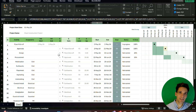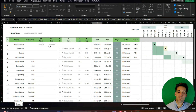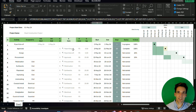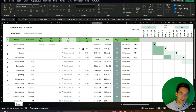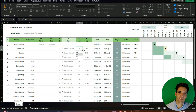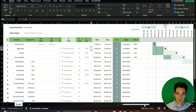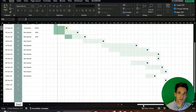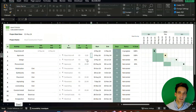You can list out your tasks, you can assign these tasks to an individual, you can manually set the activity start and finish dates, or you can do it using dependencies. For example, you can link activities based on the sequence. We've got different types of linkages — finish to start, start to finish — depending on what you need. If you've used dependencies, it will automatically calculate the start and finish dates and plot a Gantt chart.